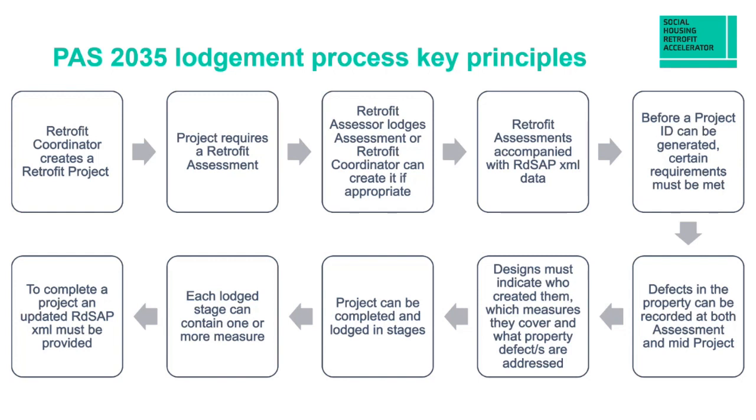So defects in the property have to be recorded at both the assessment stage and at mid-project stage. Designs must indicate who created them, so there's some ownership, which measures they cover, and what property defects are addressed as part of those measures. The project can be completed and lodged in stages, so you don't have to wait for the retrofit to be complete to lodge everything. As each measure gets completed, it can be lodged. And then finally, to complete a project, the updated RDSAP or EPC must be provided.